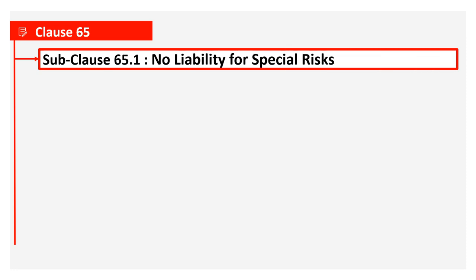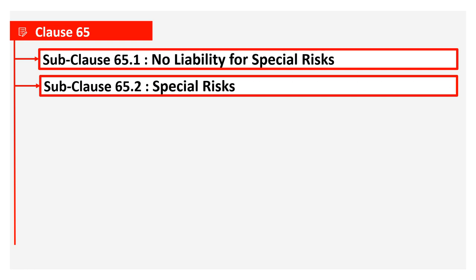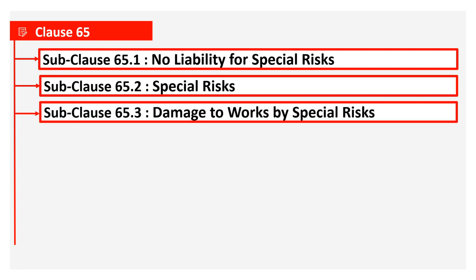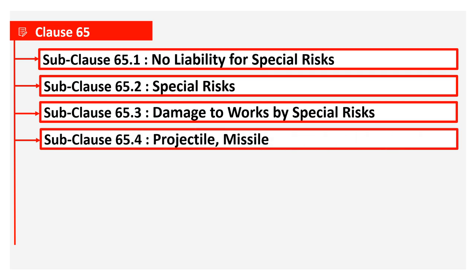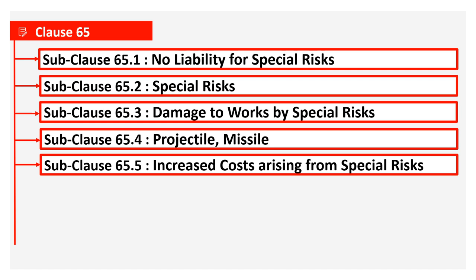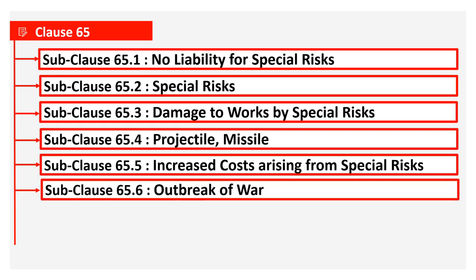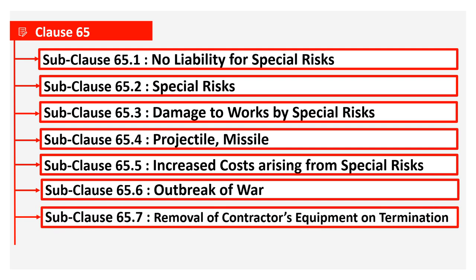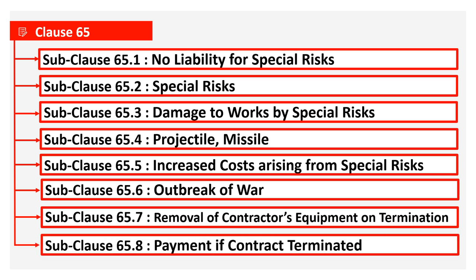Clause 65 contains the following eight sub-clauses: 65.1 No Liability for Special Risk; 65.2 Special Risk; 65.3 Damage to Works by Special Risk; 65.4 Projectile and Missile; 65.5 Increased Cost Arising from Special Risk; 65.6 Outbreak of War; 65.7 Removal of Contractor's Equipment on Termination; and 65.8 Payment if Contract is Terminated.